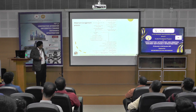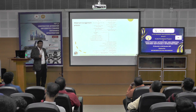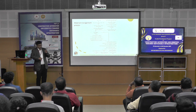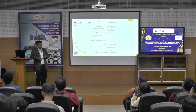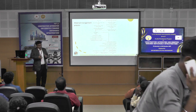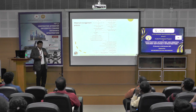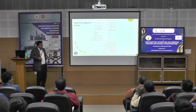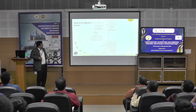Based on site requirements, the store issues material to the project site through an indent form. The indent form specifies what material is required, in which area, and includes the construction manager's signature, material code, and record code for cost tracking. Non-consumable or unused materials are returned to the store. This is how the material management process is carried out in the industry.